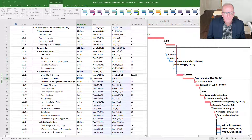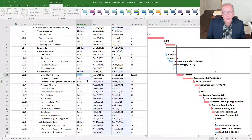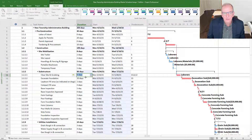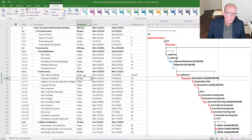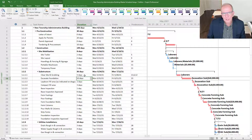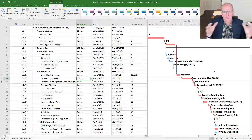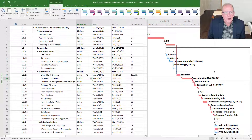This is not a great way of doing it because you're not even going to be sure how much extra time you've allocated to the different activities. And using Parkinson's Law, if somebody thinks they have six days to do something, it's likely going to take them six days when really it should have taken five. So that's one of the psychological problems. People pad some of their activities, or when you ask them how long something will take they give themselves a comfort zone — and after a while they don't even know how much things were padded, they consume the full amount of time, and then it ends up running late.